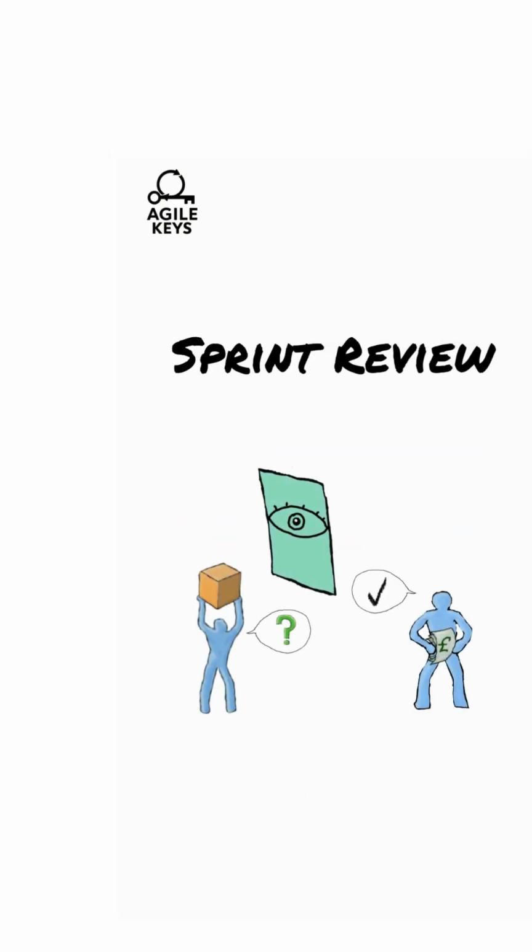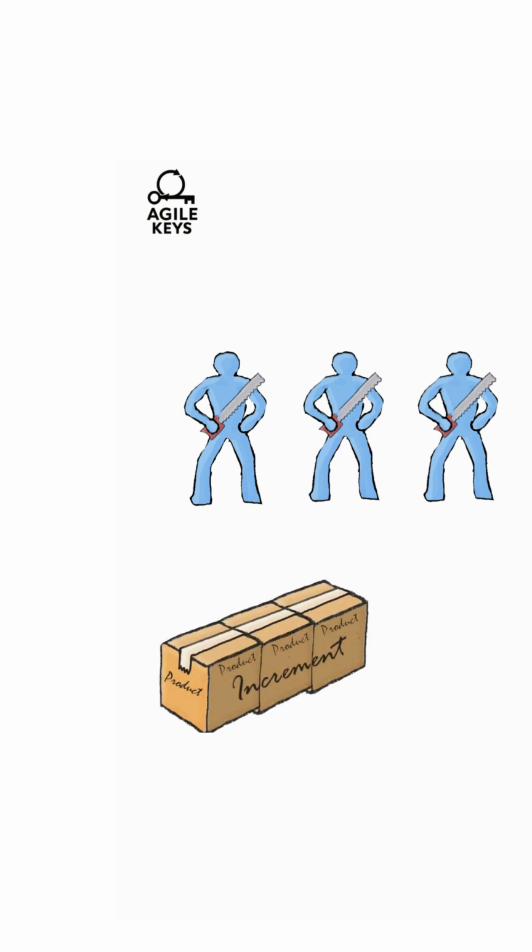Today we're looking at the sprint review, the event in Scrum where the value is checked by the stakeholders. The sprint review begins with the product owner explaining what the sprint goal was and how it furthers the product goal. The developers will then interact with the stakeholders. They will show them the increments that have passed the definition of done, or more usefully, the stakeholders will utilise those increments in order to understand whether or not they are fit for purpose, giving the team feedback along the way.